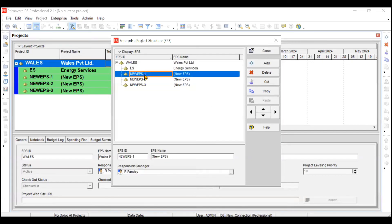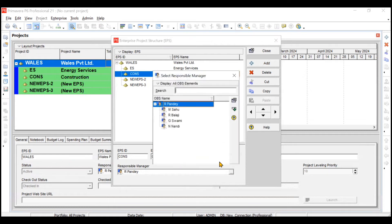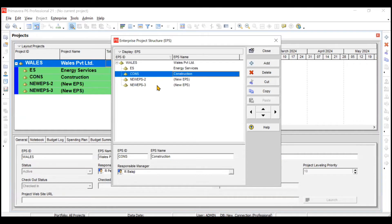The next sub-EPS is Construction. You can choose an ID like 'CS' or 'S-CON' — it just needs to be unique. Construction is headed by R. Balaji, so go here, click on R. Balaji, and click Select. The construction business will now be assigned to R. Balaji.